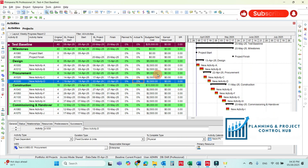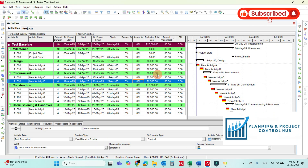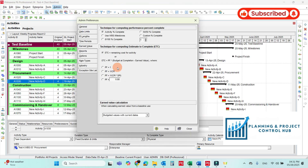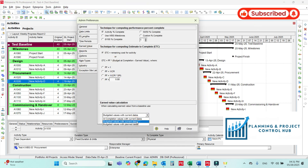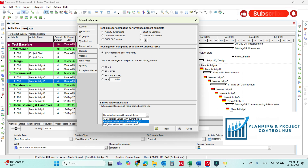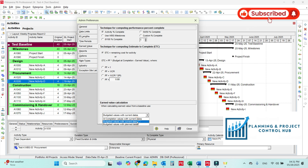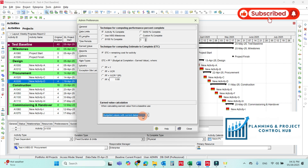Before going to start updating the progress in the baseline, there are some necessary settings we must do. Some of them are done by default and some settings we must check. For example, the earned value and the admin preferences — we have to check the earned value. We must select the appropriate option. I will make a detailed video on which option and when to use these specific options. For now, we will select this option to accurately reflect the earned value in our report.